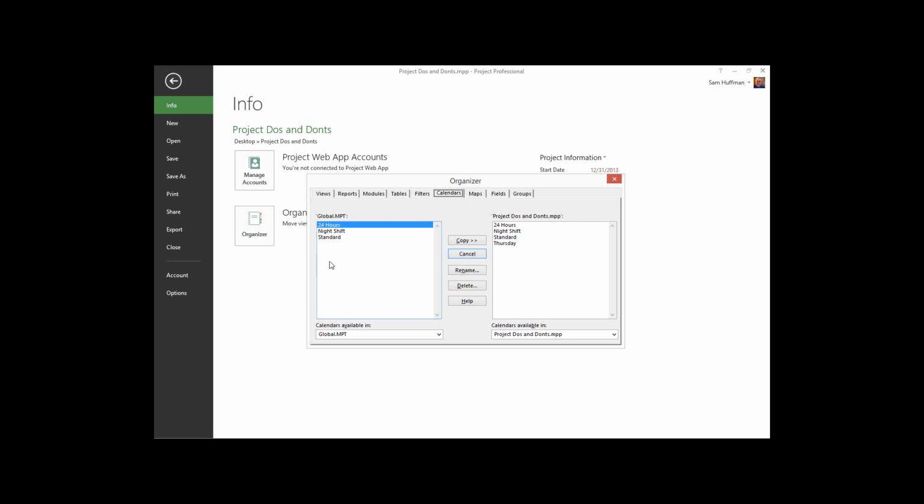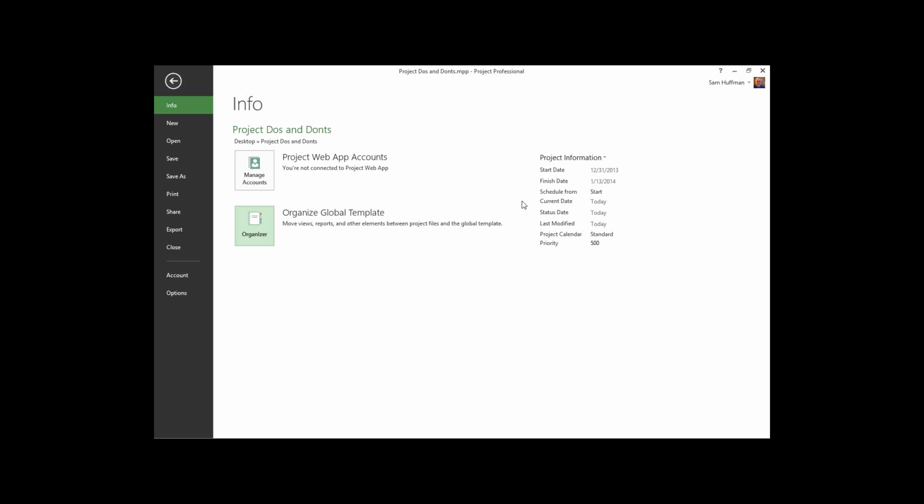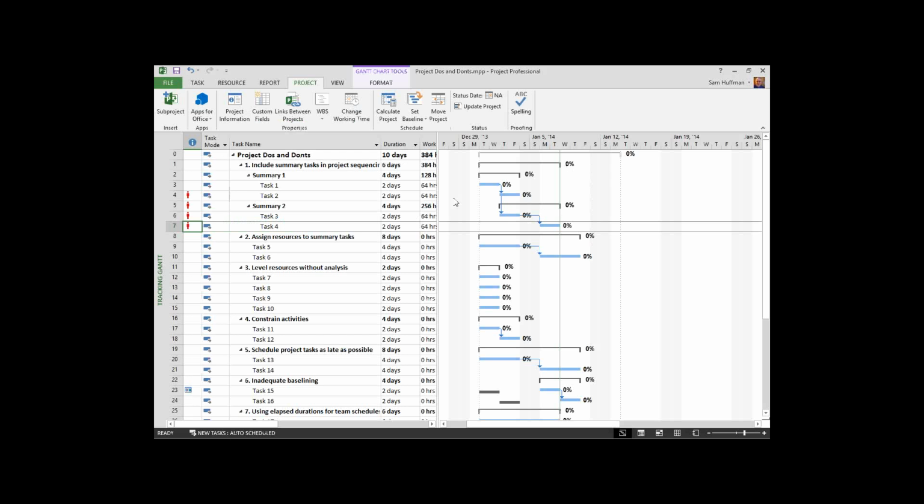This would give you the chance, notice there's a delete key, to delete the one that's problematic, and then create a brand new calendar from the standard to start all over again. So it would minimize the amount of work that you have to do. But I would protect these out-of-the-can calendars by creating copies of them that you would use and name them accordingly. Hope that helps.